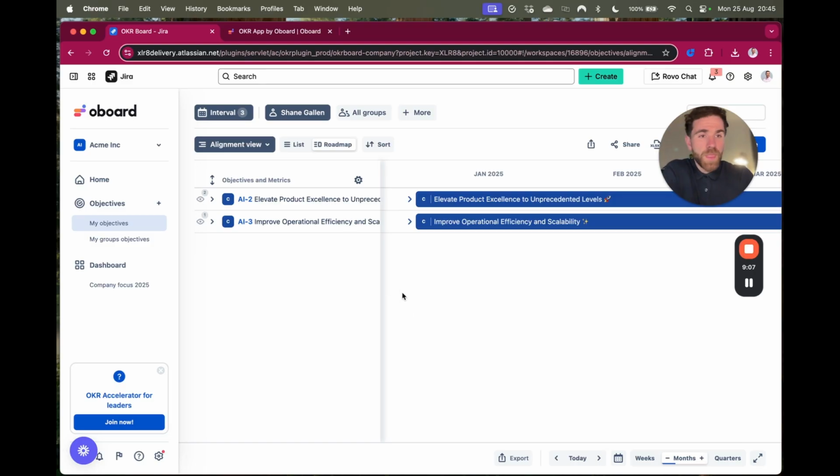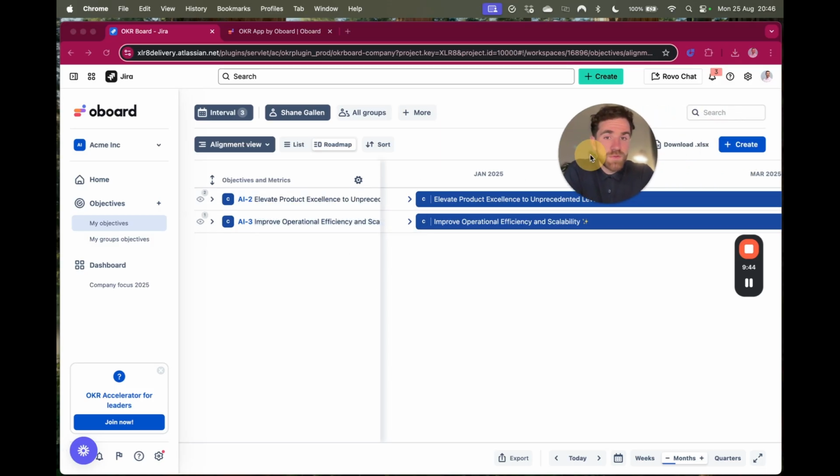So going back in time, talking again about those outcome-based roadmaps. Working with those types of teams, we would have had a company or business objective set annually, and potentially a couple of objectives that we're looking to contribute towards. Then we would set our objectives for the quarter that are laddered up to a product objective that connects to that business objective. Then we would set the key results that we're looking to move the needle on this quarter. And then we'd think about what work could help us do that. This is where this type of roadmap really becomes useful.